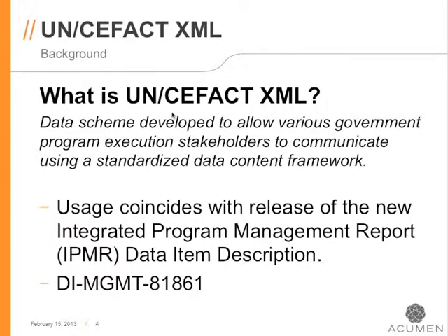So let's get back to a couple of the basics here. UN CEFACT goes hand in hand with what we call the IPMR DID, Integrated Program Management Report, Data Item Description, and I give you the DID number there. In fact, take a note of that or take a screenshot if you haven't seen it. Although I'll be showing you the website where this information is housed, if you Google that DID number with the full text there, the DI-MGMT-81861, it'll come up right away on your search engine screen. In fact, I tested that just before the webinar today to make sure that that's a true statement, and as of right now, it is. So that'll help you get more information.